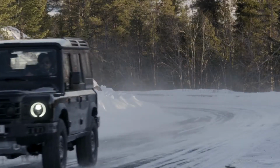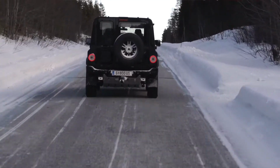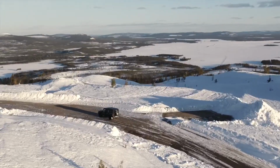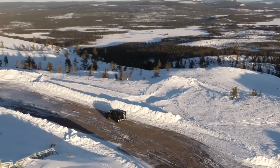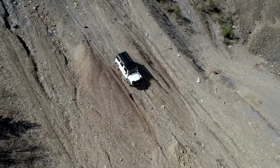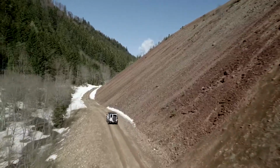In terms of the whole package of field testing, the figure that's always been in my head is this 1.8 million kilometres of testing. Is that on track? At the moment, all the testing is ongoing. We have a plan with the vehicles. They're running those kilometers, I would say, on-road and off-road. We have 1.8 million as a final goal. We will ride more than 300,000 off-road kilometers out of that. Probably we are 20 to 25% through at the moment.